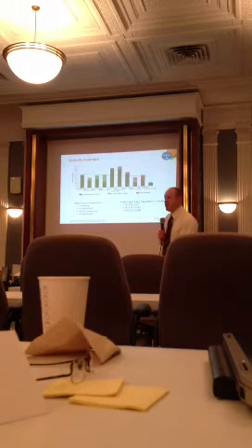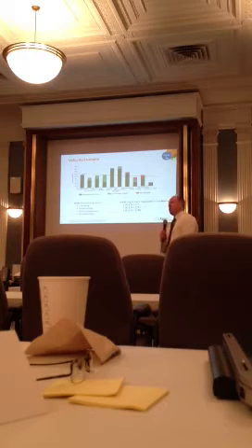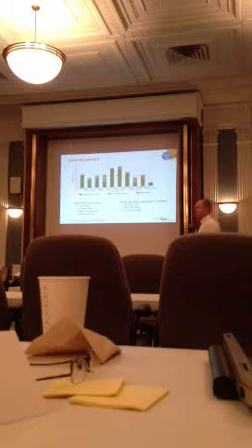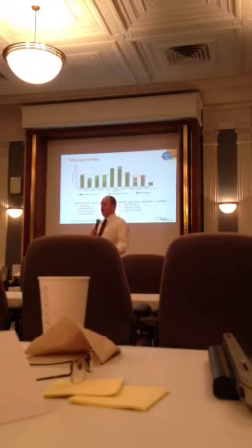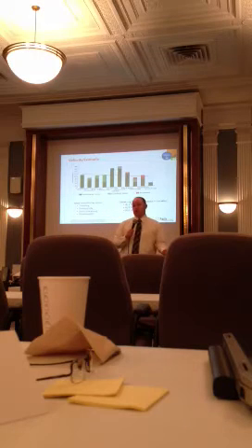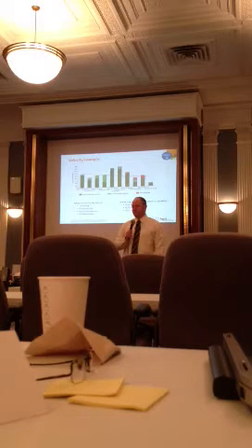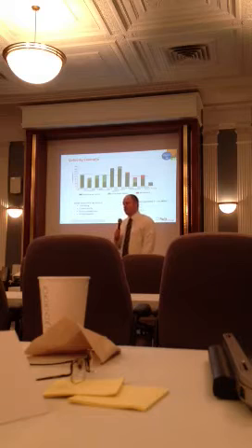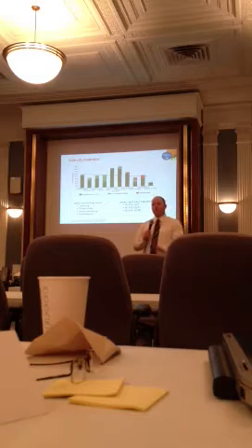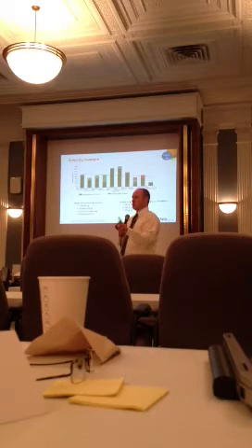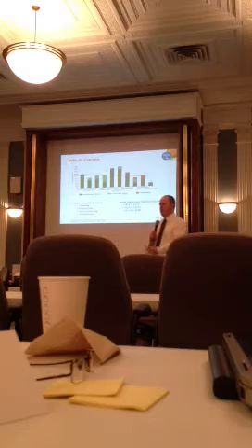How long do you track your non-acceptance? You track non-accepted work forever until it's either no longer valuable and you just need to close it out, or you get acceptance on it. So if they say, hey, don't work on this anymore, you're taking it completely off. If it's no longer valuable, then you just take it off the chart, even though you may have burned that. Well, there's a catch to that. If you've already worked on it, we'll hit that on the next chart that you'll see right after this.